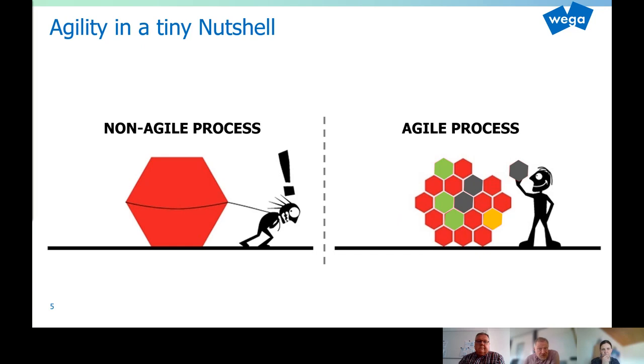Regarding the project planning, this of course implies a certain complexity and difficulty, as we need to deal with the inability to plan our project from start to end, as we are used to do in the classical waterfall methods. One of the elements to reduce this complexity and uncertainty is to break down the work package into small plannable batches. We call them increments. Based on the Agile key pillars of transparency, inspection, and adaptation, we try to deliver and review small but fully integrated increments of the system quite often to be able to make adaptations if necessary. The development of these increments is usually much better manageable than the planning of the whole system at once. In addition, the Agile product development team should always be interdisciplinary and combine all necessary skills and roles to develop a product. And all of them must collaborate and communicate on a frequent basis, ideally daily.